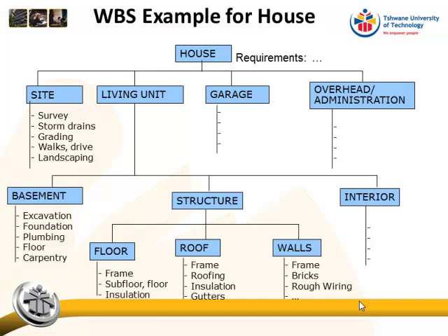And remember, I said that somebody with OCD wouldn't be good at setting up work breakdown structures because they would want symmetry, and symmetry is not necessarily what makes a good work breakdown structure. So you don't break everything down to exactly the same level. You break it down to the necessary level.